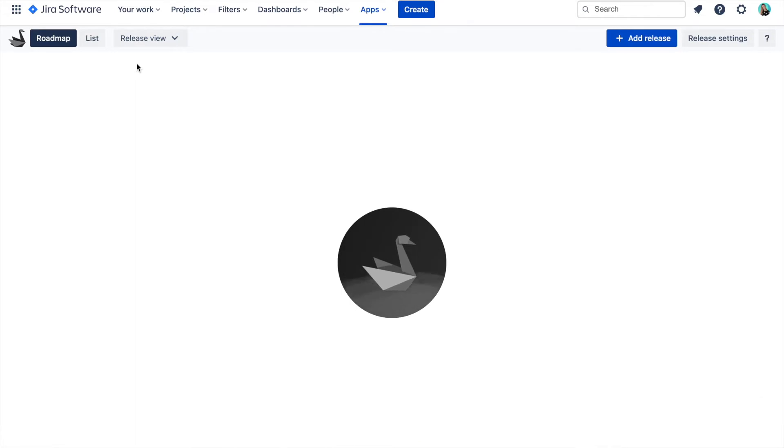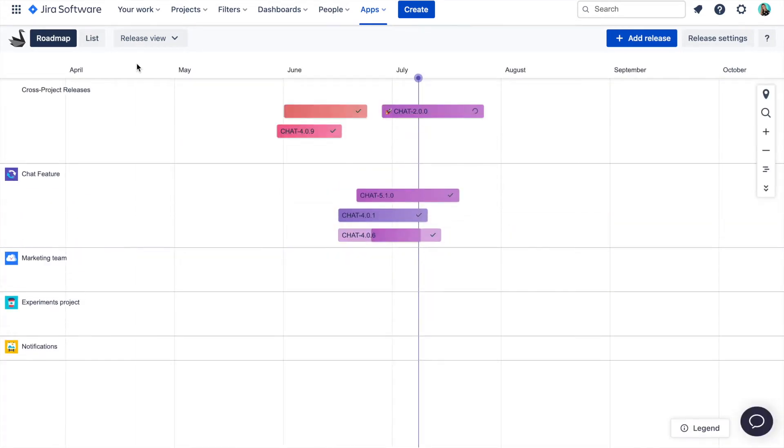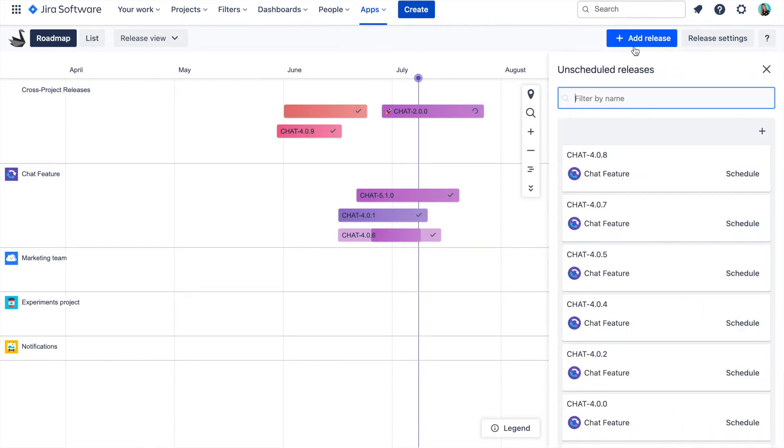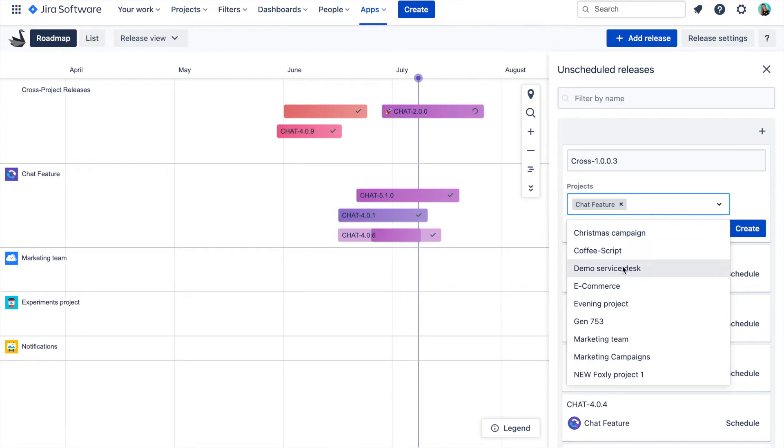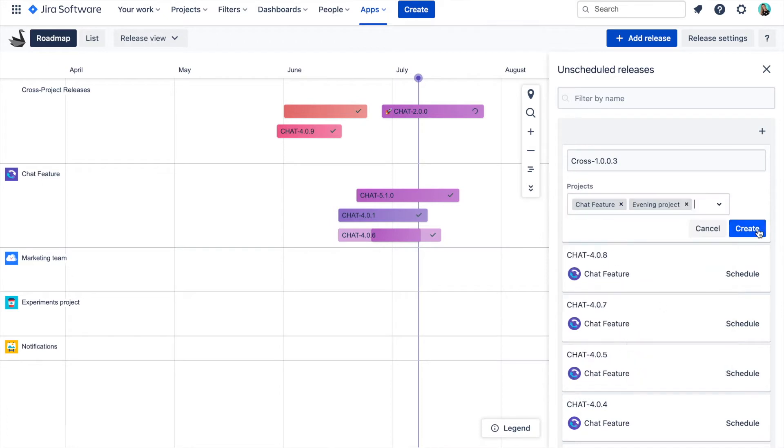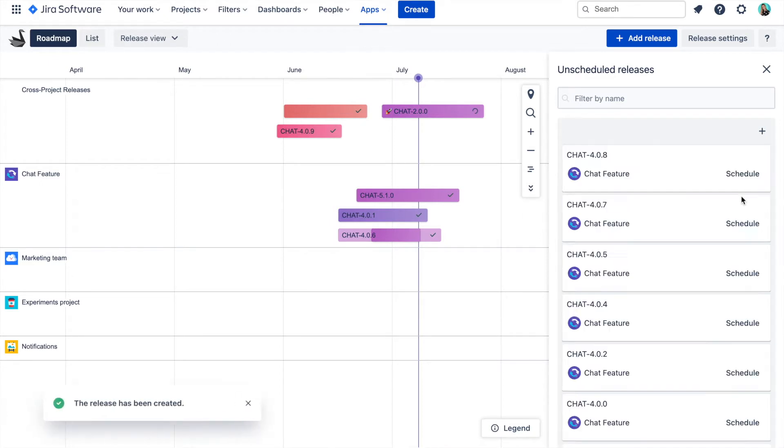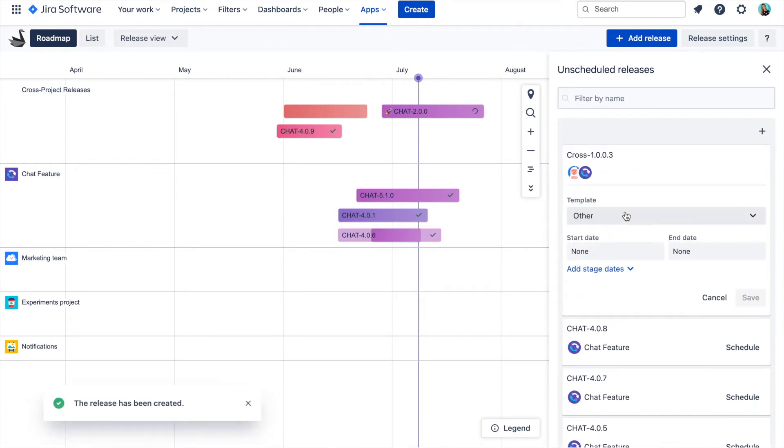Now when we are in the Swanly release view, to create a cross-project release, just click on the add release button and then here on the plus button. This is a simplified create release form where you can give your release a name and select projects you need. And then just click on create button.